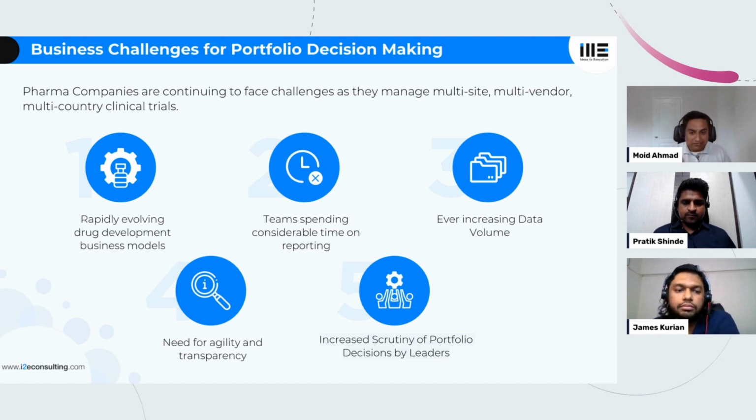I'll give an example of a research done by, I think, Wellington Project Management Consulting UK. They categorized the activities taken by PMOs, and they found the activity on top, done by most of the PMOs and most of the time, was creating reports. When they tried to find out the average time spent on creating reports, it was around 68% of the time. That's a huge number and an astonishing figure. 68% of the time the PMOs are spending on creating reports.